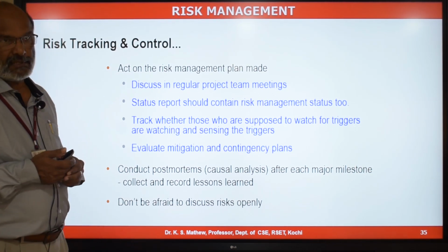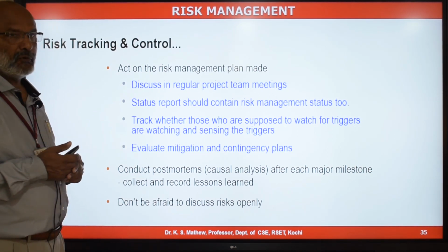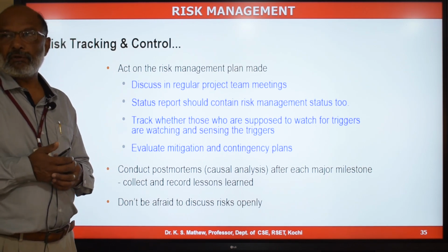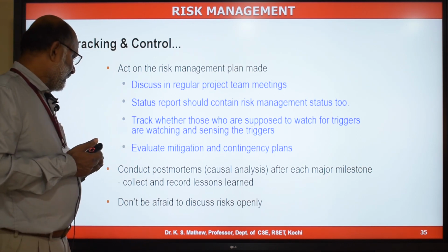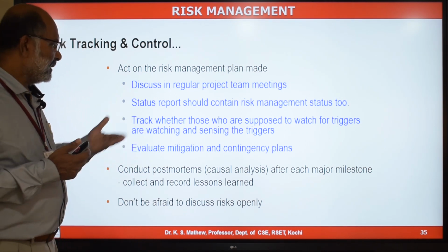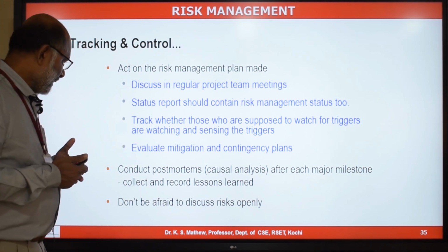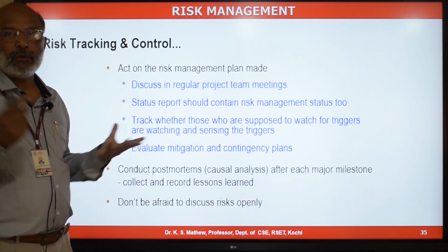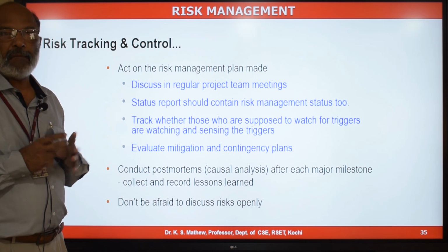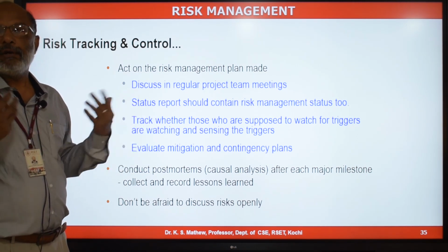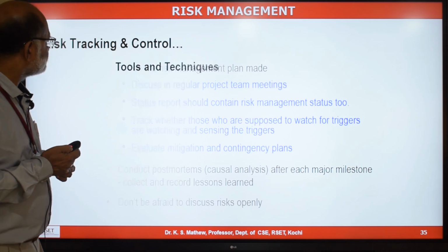Conduct postmortems. At the end of the project, you usually need to do some postmortem analysis or causal analysis whenever the risk occurs, and see and document the lessons learned in the project in terms of risk management. And don't be afraid to discuss the risk openly. Whenever the risk is known to others, it will be very easy for managing the risk, because you will get a lot of input from your own team members on how to manage those risks.